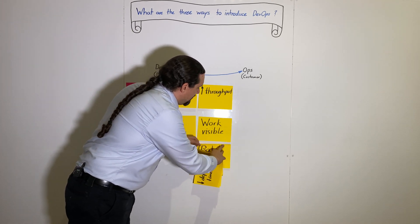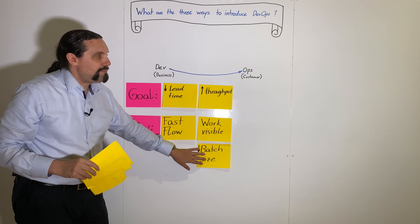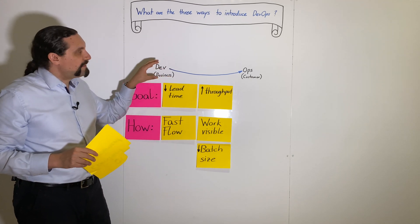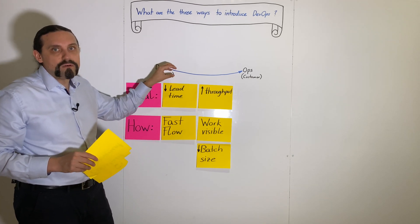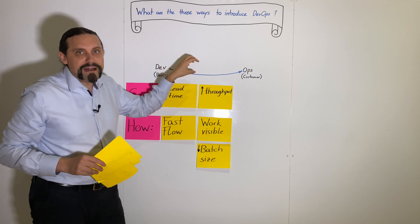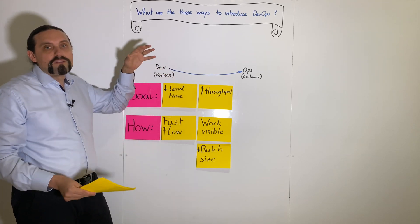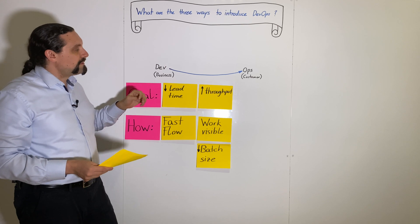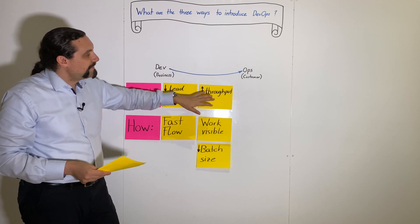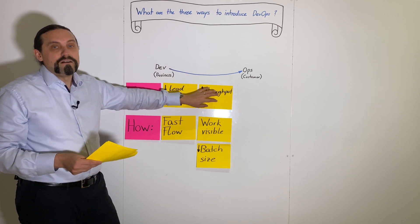And secondly, we are going to reduce the batch size. We want to have small items, small features, small value items which flow through the system, not the big items or big chunks, because we want to optimize for throughput.